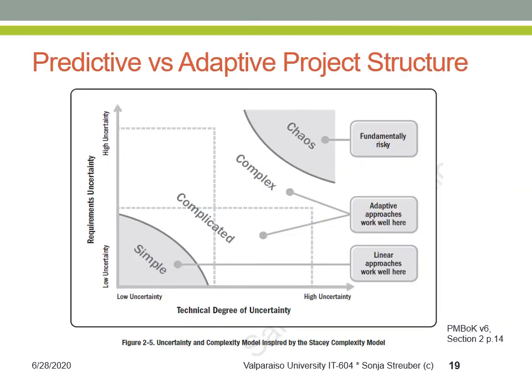So when should you, as the product owner and project manager, use high-pressure, high-visibility Agile methods to get something built? And when should you use lower visibility, lower pressure waterfall methods? As you can see on this chart, that really depends on the technical degree of uncertainty, here shown on the horizontal x-axis. If everyone knows their job well, and there are no bad surprises hiding anywhere in the design, a linear waterfall approach might work well, especially if all the technical requirements are well defined and not too complicated to build, like a website, for example.